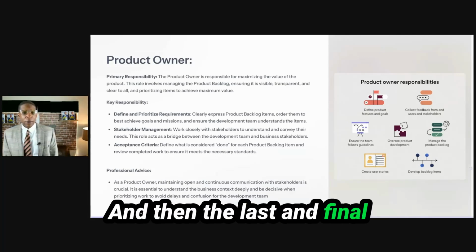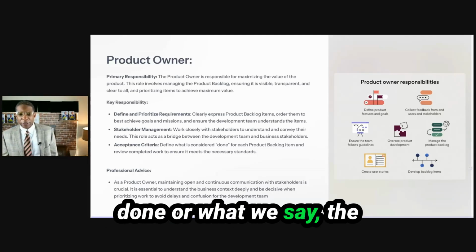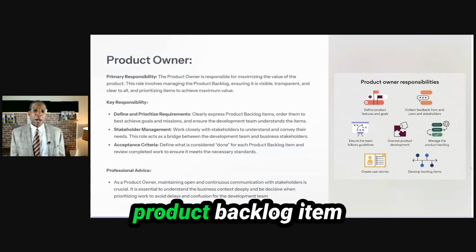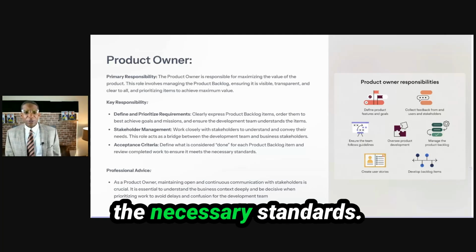And then the last and final piece is acceptance criteria: define what is considered done, or what we call the definition of done, for each product backlog item, and review completed work to ensure it meets the necessary standards.